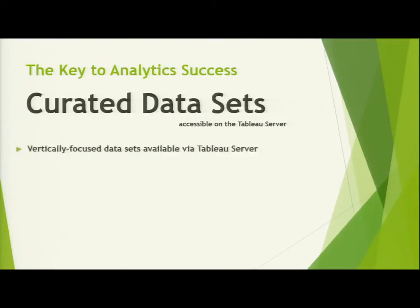So, curated data sets. We're looking at vertically focused data sets available on the Tableau server. And when I say vertically focused, the temptation is to create this big, huge data warehouse that does everything, but don't go there. First of all, the scope of the project is too large, and you'll never, ever get to that ideal. So rein it in and look at information like WIP, for example. Just show me the WIP information, show me the raw data, and then I'll slice it and dice it however I need to do.